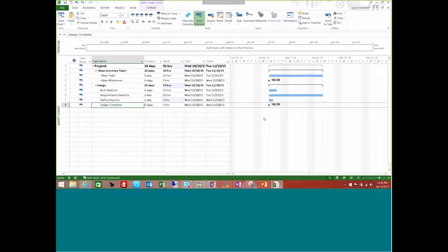Everything starts on the 28th of October because that was my project start date. The default setting is that all tasks will begin as soon as possible. So as soon as possible means on Wednesday the 28th, everything is going to start.